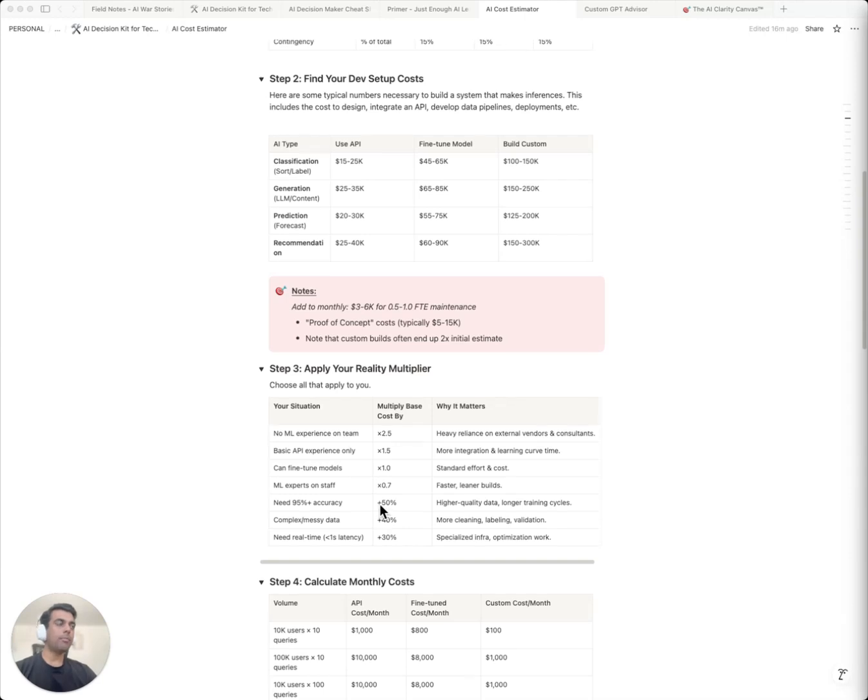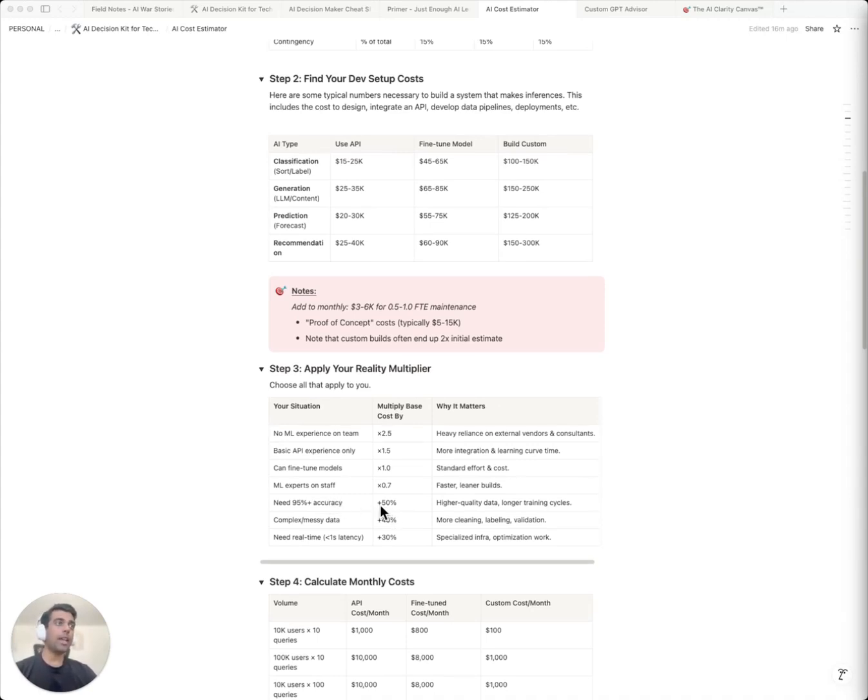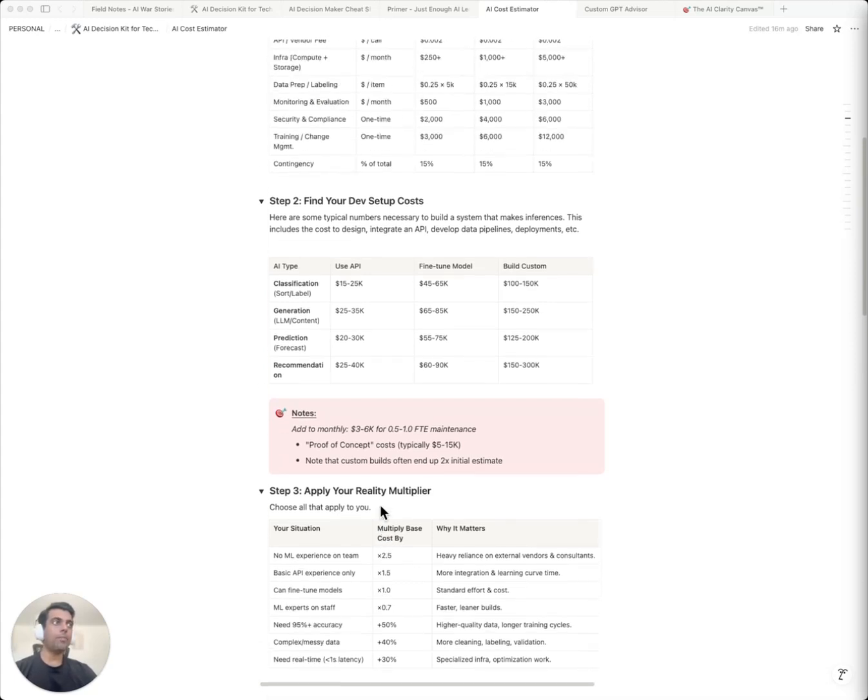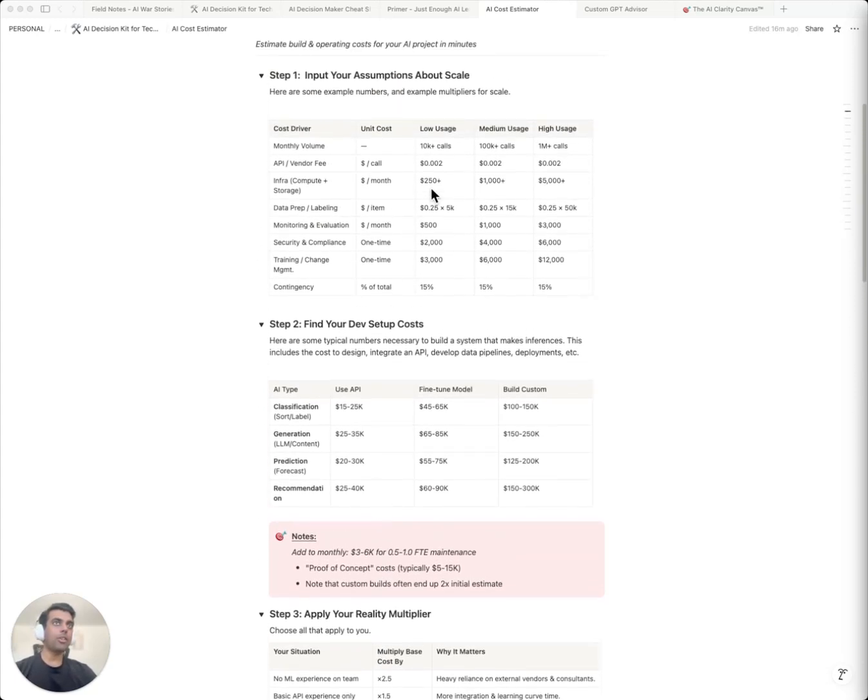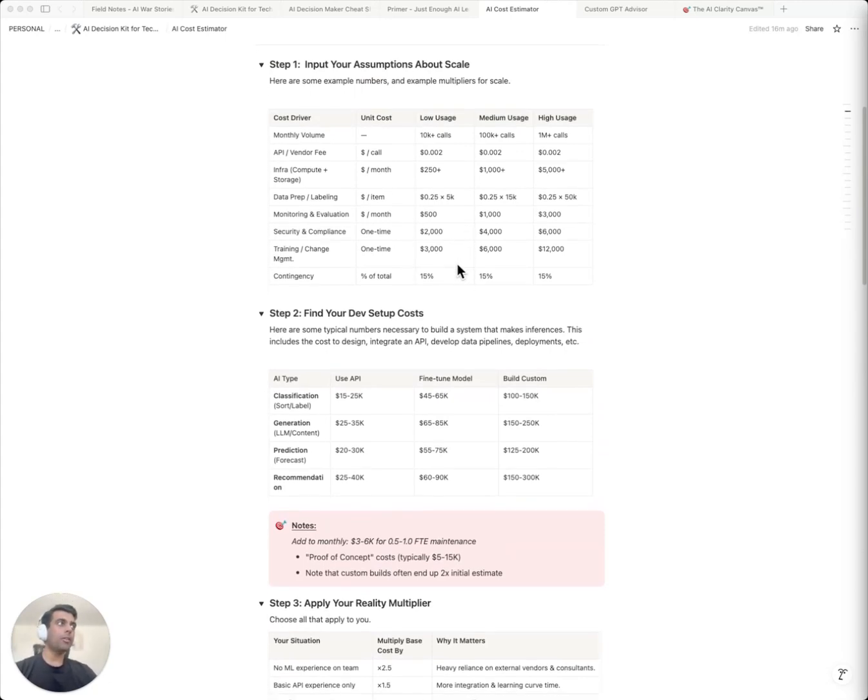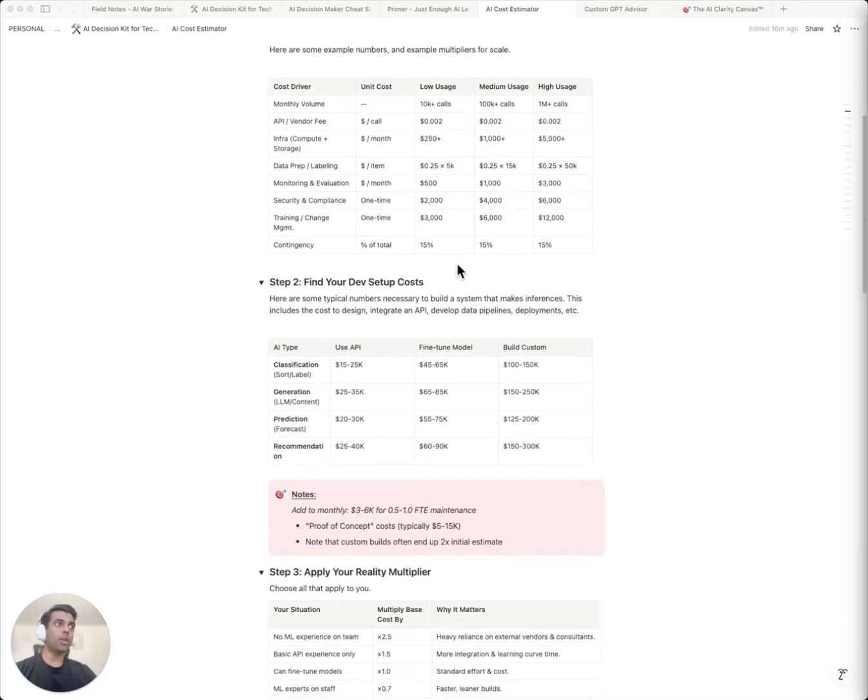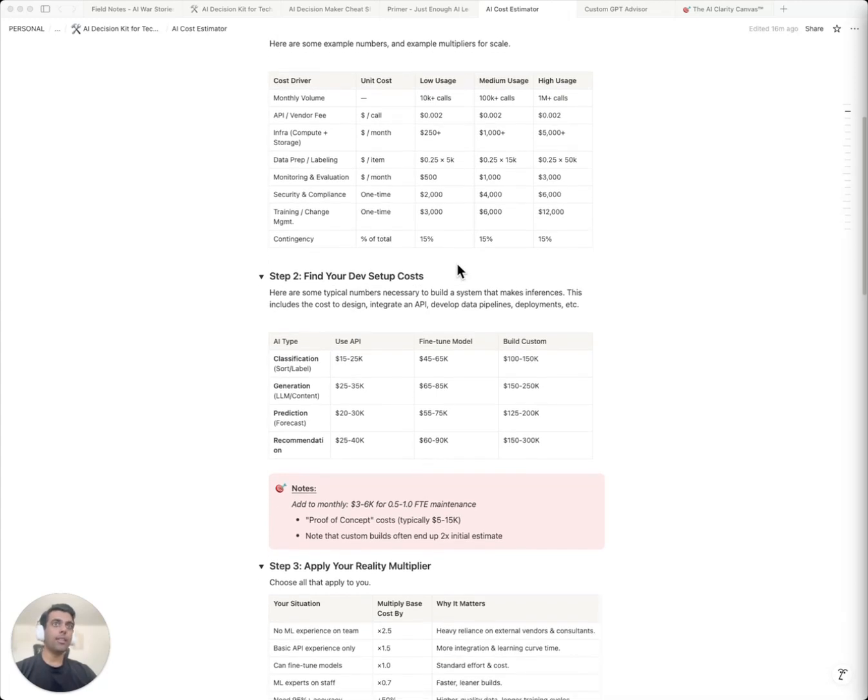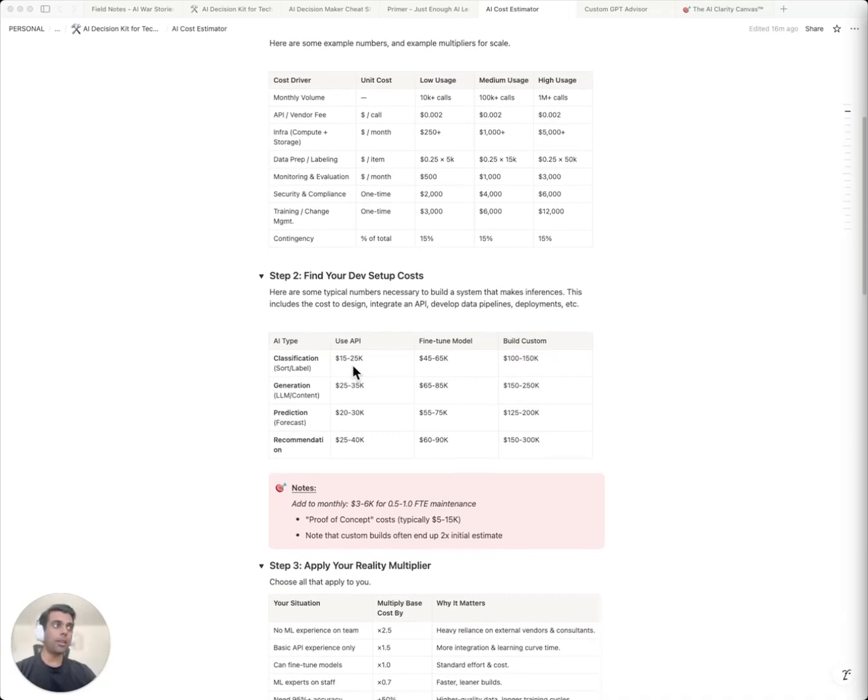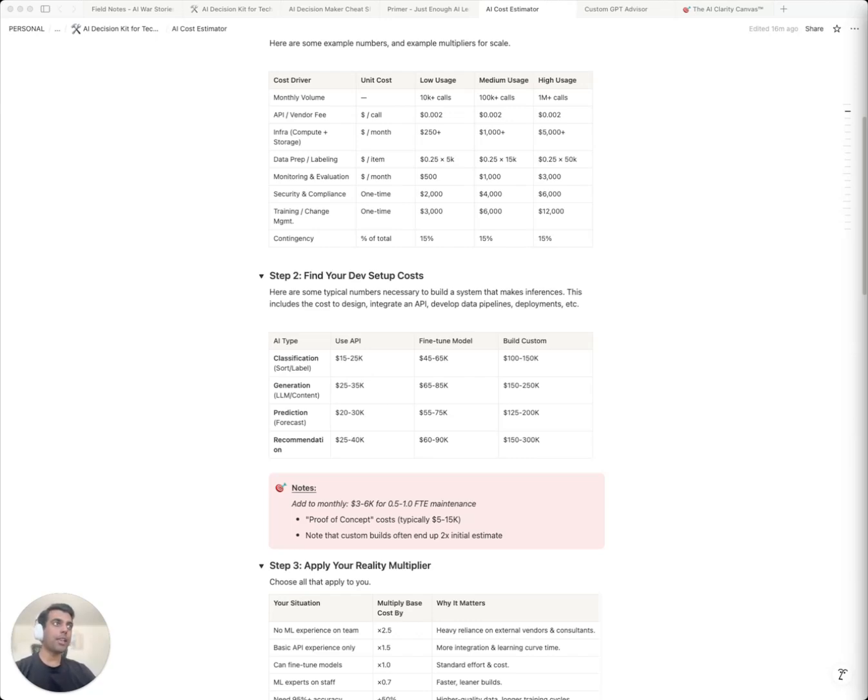But watch what happens. There are some reality multipliers that exist. No ML team? Multiply by 2.5. Need high accuracy? Add 50%. Now we're at $95,000 just to build this. Add monthly operations, infrastructure, etc., and that's about $6,000 a year. Over a year, plus setup costs, you're looking at over $200,000. The vendor quoted you $20,000, but you'll end up spending $200,000. And this is just year one. Over three years, half a million dollars. This is how those field notes disaster stories even happen.